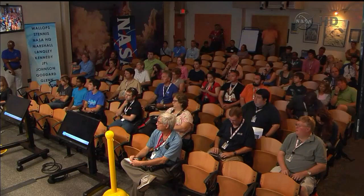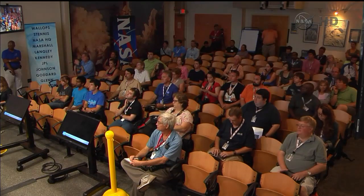Sure. Typically, we do a lot of work to ensure those types of things. For this one, we have taken an extra step, like you mentioned, because of just the time of year that it is, and it is a weekend day. So we've made a huge effort to go out and talk to all the recreational boaters, make some visits to the harbors that are here where people would be launching their boats from. We also have, per the Code of Federal Regulations and with the help of the Coast Guard and Northern Virginia Marine Police, an area called a danger zone, which is about a 30 nautical mile sector just off our coast here, where we have fine and arrest authority to actually clear people out of our hazard areas. So we have made those extra strides for this launch, and we're confident that we can have a clear range for the first second of that 5-minute window.